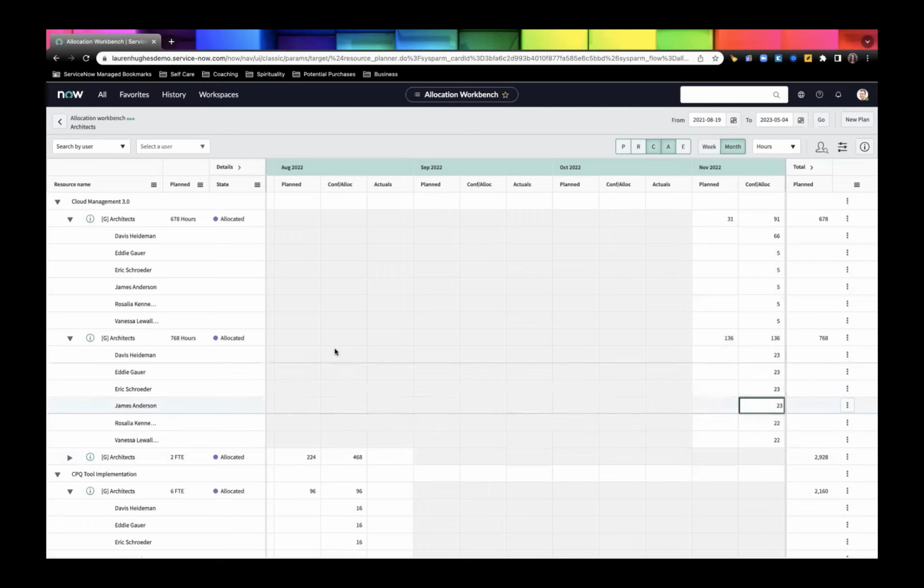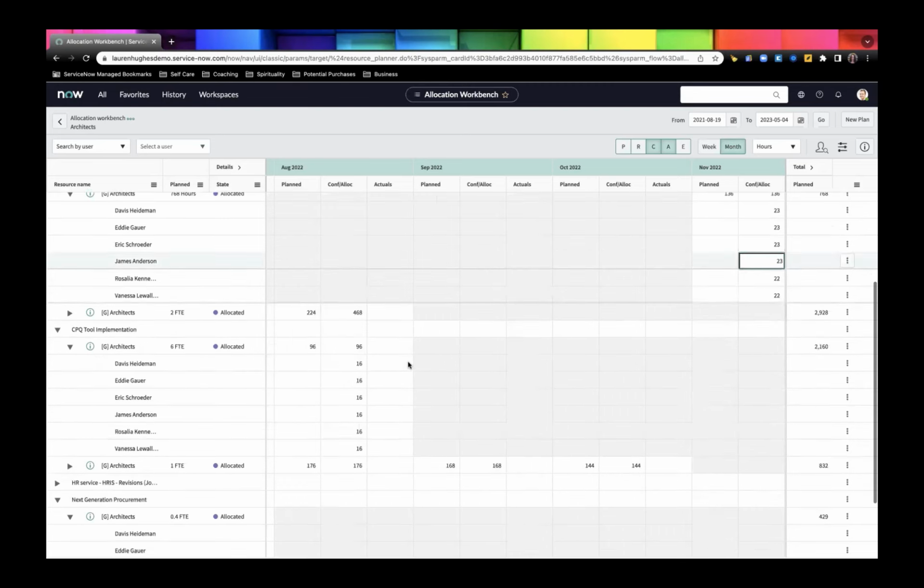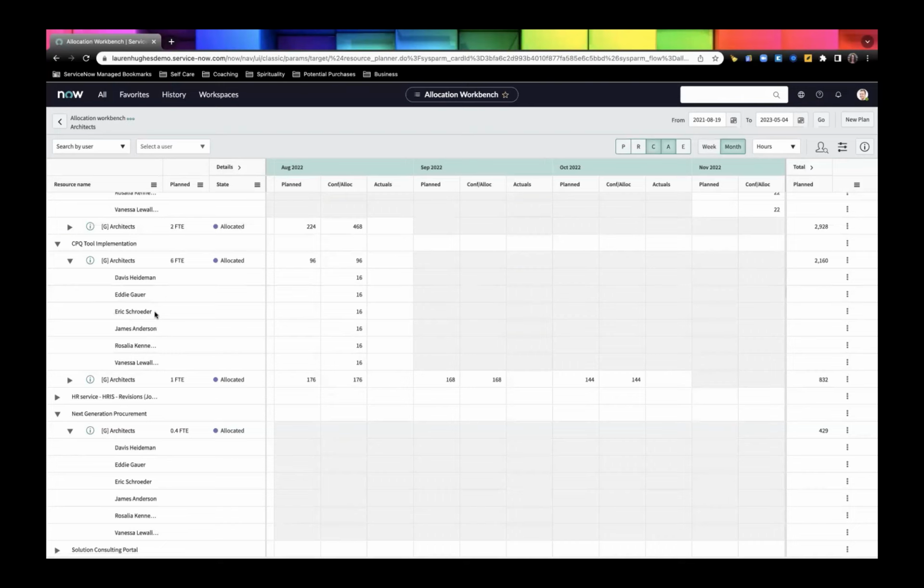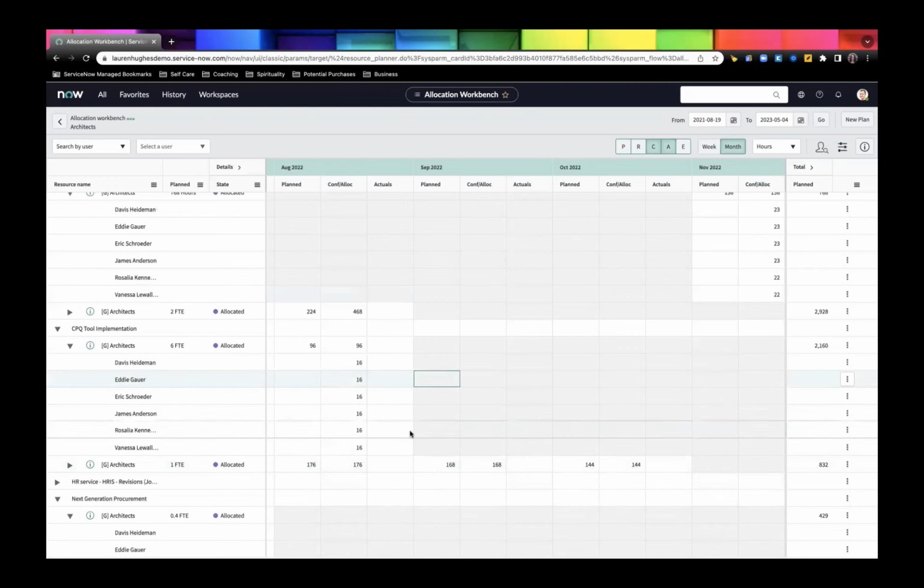You're not doing it by what they're working on, as in projects. You're doing it by the groups. So I'm managing it by the group specifically and making sure the group itself's resources are balanced. Right. And since the resource allocations are across all the members of the group, what I want to see here is, okay, well, I've got planned 96 hours. I've confirmed and allocated. I don't have a flag here because it's split and it covers all the hours that I have planned. But if I zero this out, then we would get a flag. And it would say that there's not enough hours allocated to cover what's planned. Right, okay. That makes sense now. Thank you. No worries.